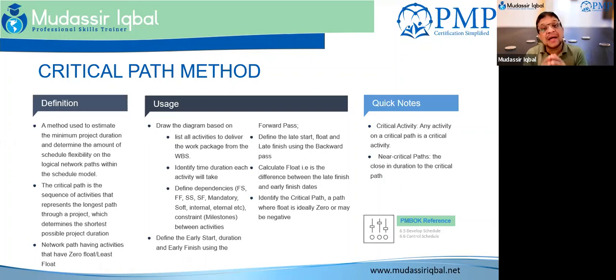So your critical path cannot be done until and unless you know what equipment and what human resources you are going to use. So it's a resource loaded structure. You need to know what resources would do that job so that you can expect the timeline of the process.